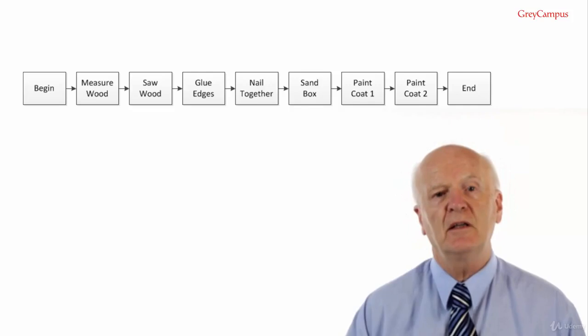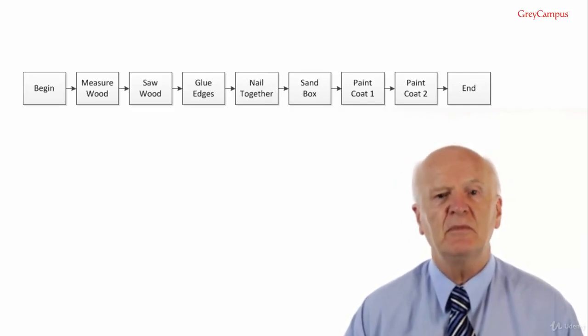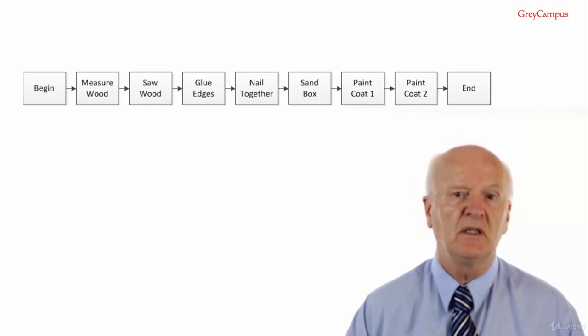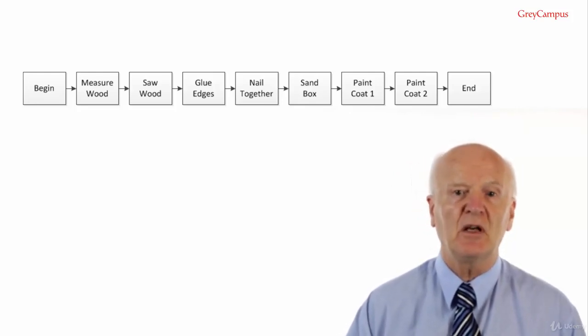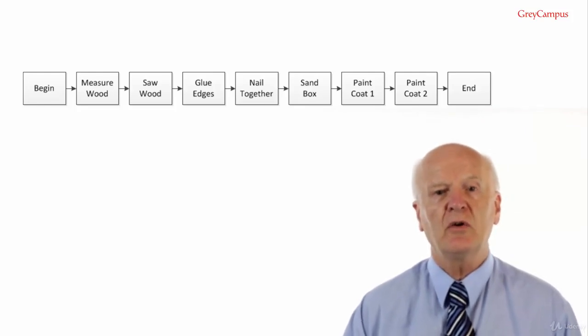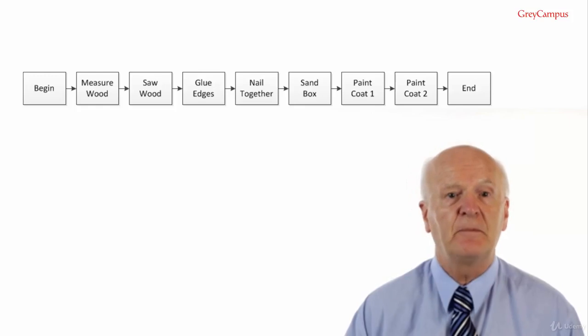Now we can draw a network diagram. Each rectangle in our diagram, which represents a single activity, is called a node. And so our diagram is referred to as an activity on node diagram. The arrows connecting the boxes are called the relationships, and we will discover these soon.